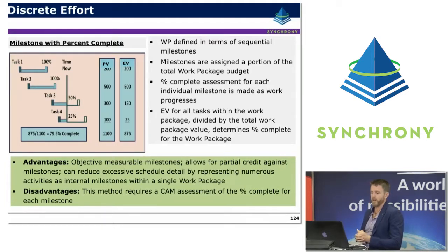The advantages being you have objective measurable milestones. It allows for partial credit. It can reduce excessive schedule detail by representing numerous activities as internal milestones within one package. And the disadvantage being that it requires a CAM assessment of percent complete, but once again that's also an advantage.